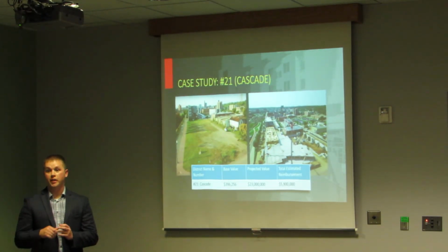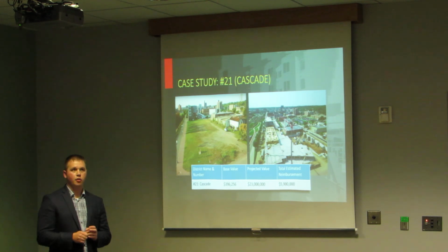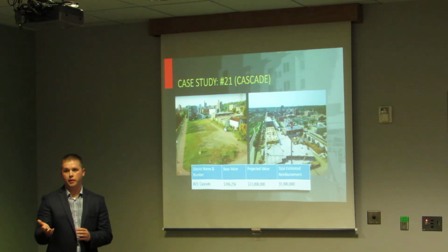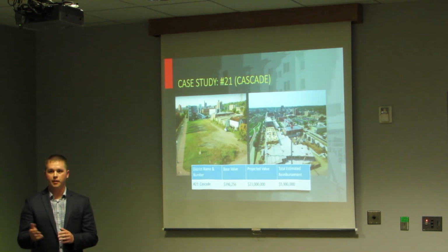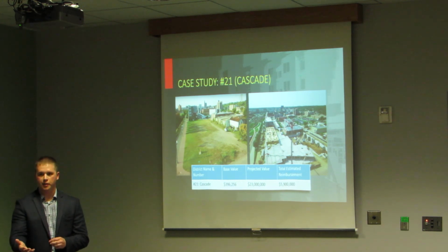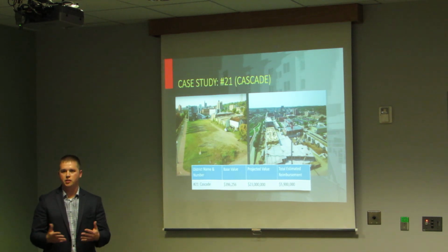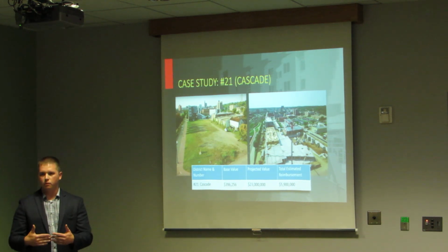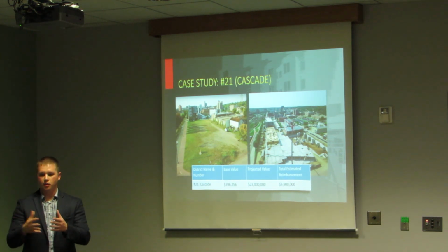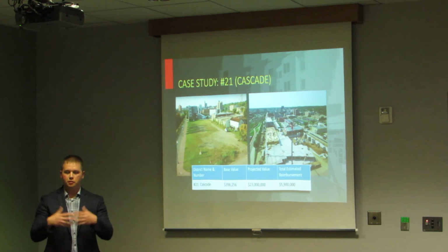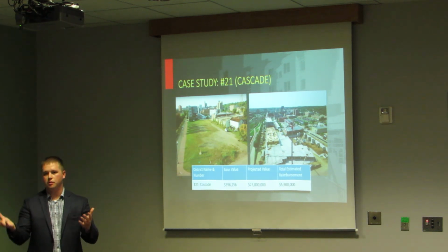So we do get a separate development-specific agreement. In that agreement it said you had to have a minimum of 20,000 square feet of commercial space in that building, and a minimum number of units. They were also going to add parking, so they had to do a minimum. They were lower than what was expected; we thought there was going to be 250 units, I think the limit was 200 or something.